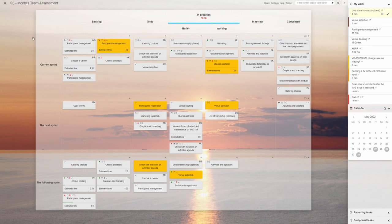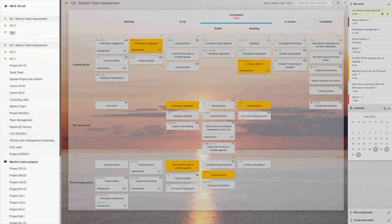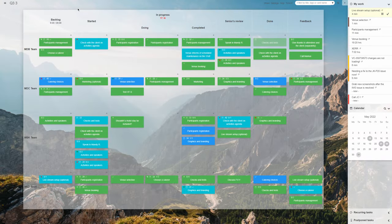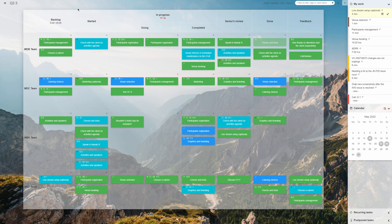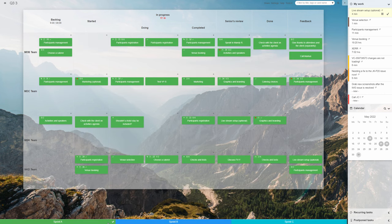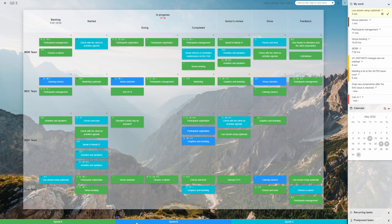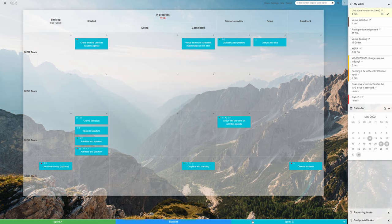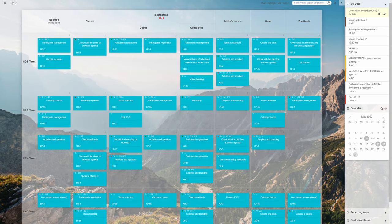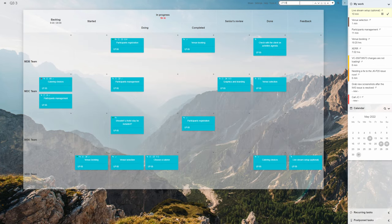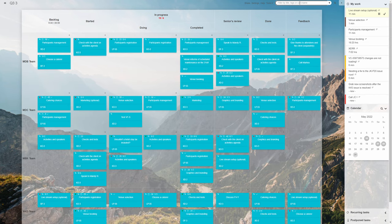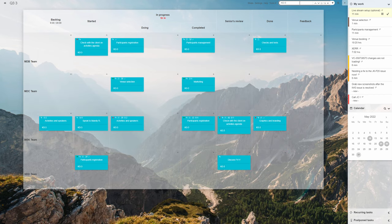The last proposition is for a company with several teams working on one sprint each but wanting to keep all their work on a single project board. The idea is to assign a different card color to each sprint's tasks, or to tag related cards with a shared sprint reference, or create a chain of dependencies between one sprint's items.